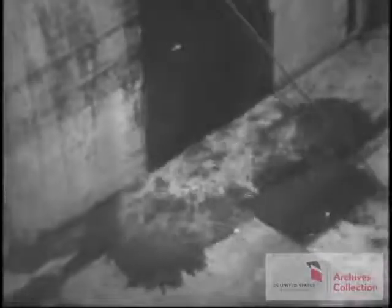At 4:14 the afternoon of June 22nd, 1951, the first waters of the Muddy James rushed in to touch her keel. Hull number 488 was baptized into natural element, stood 70% complete, an unprecedented record in the history of any major passenger vessel at launching time.